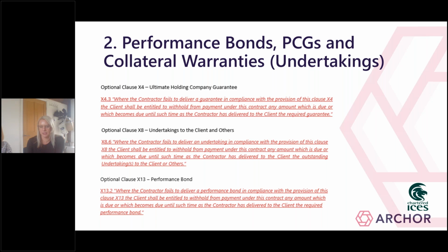The key amendment that is made to these clauses is set out on the slide, and that is to make provision of these documents a condition precedent to payment, and that gives the client the authority to withhold all sums due to the contractor until the documents are provided.